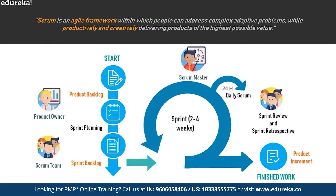There are certain key terms you should know when talking about scrum. A scrum project is comprised of three vital roles: product owner, scrum master, and development team. There are four events — sometimes called ceremonies — which are sprint planning, daily scrum, sprint review, and sprint retrospective. And there are three artifacts used to track work: product backlog, sprint backlog, and product increment. There are also burndown charts. If you want to know more, refer to the scrum video in the Edureka playlist linked in the description below.